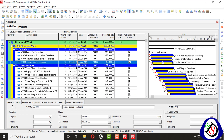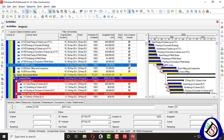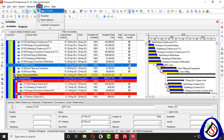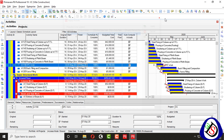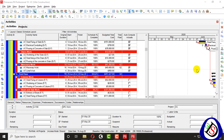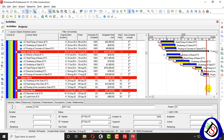You can see I have auto-computed my activities with just one click from the tool Apply Actuals — I changed my date and applied it. All the activities behind this progress line are completed.